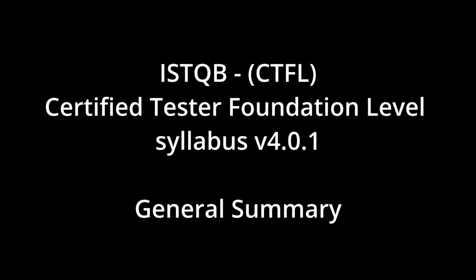And how do you communicate all this information effectively? Who needs to know? That's where test reporting comes in. You typically create test progress reports periodically during the testing activity. Their main purpose is to provide status updates to stakeholders and support ongoing test control, allowing for informed decisions and plan adjustments. Then you create test completion reports or test summary reports at the end of the activity. These summarize the entire effort, provide an overall assessment of quality, document results against exit criteria, and inform decisions about subsequent testing or release readiness.